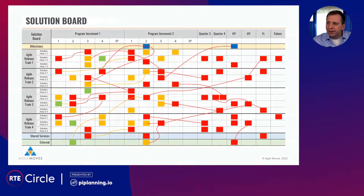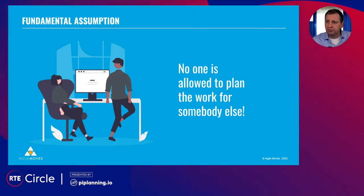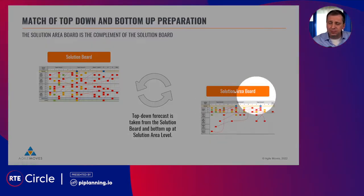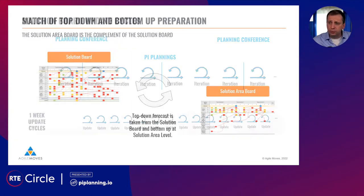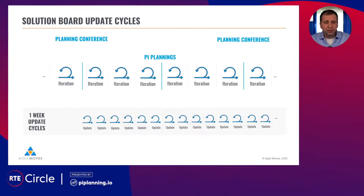No one is allowed to plan the work for someone else — this is an unwritten law in SAFe, and it applies to large systems too. The teams within the solution area drive the backlog and drive the solution board. We do this in weekly update cycles, so every week we have an aligned understanding of all the solution areas working in the solution train, represented by the solution board.